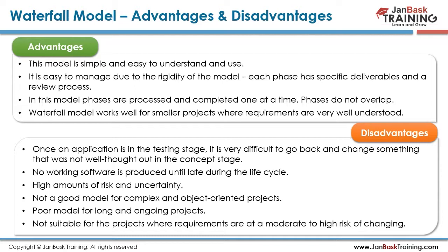So you must have seen there are two major disadvantages here. First, it is time consuming, because we have taken 4 months and only after that we came to know. Second, a lot of cost is involved, because for requirement gathering itself, 4 people have put in 2 months of time, and they've been given salaries and everything. We have charged clients as well, so cost is involved. To verify what happened in step 1, we have to wait till step 4 and 5 to understand that. So that's why it's said that the waterfall model is a time consuming process. A lot of dependencies are there, and it's not a cost effective solution as well.